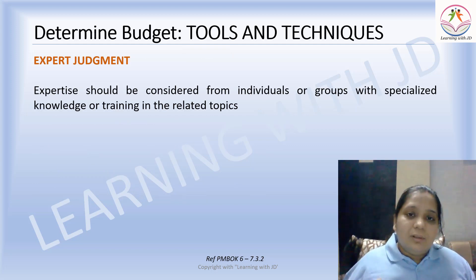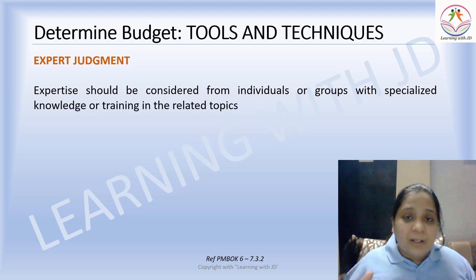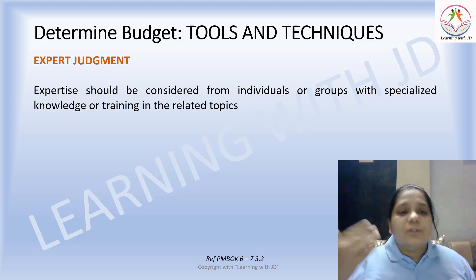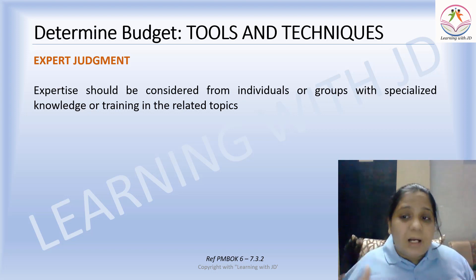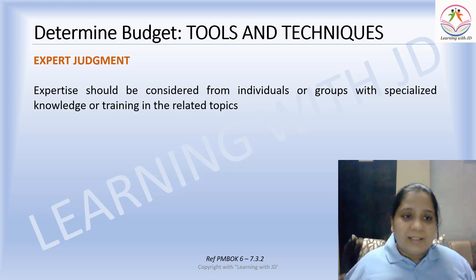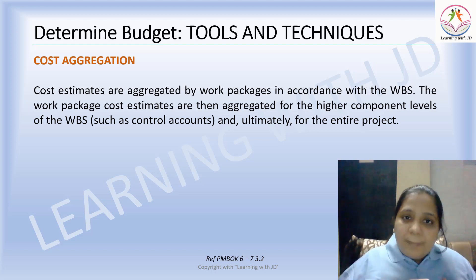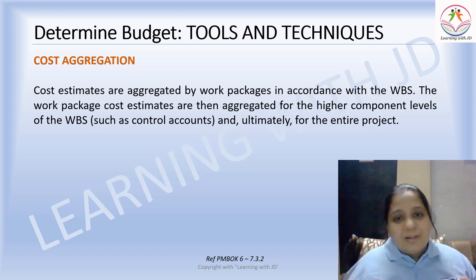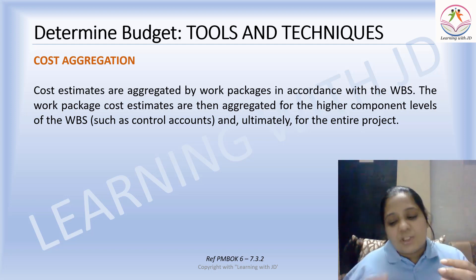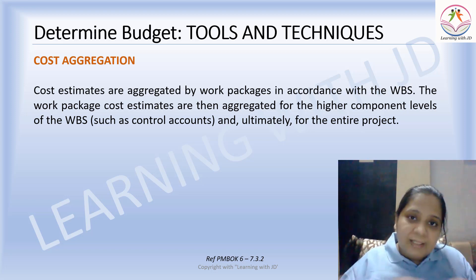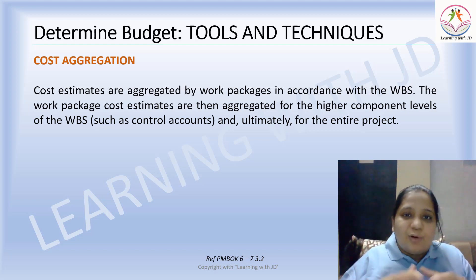Once you have all these documents, you apply tools and techniques. The first is expert judgment — you can call experts who specialize in identifying budgets. Then there is cost aggregation: cost estimates are aggregated by work package in accordance with the WBS. Work package cost estimates are then aggregated for higher WBS components and ultimately for the entire project, giving you your complete project budget.